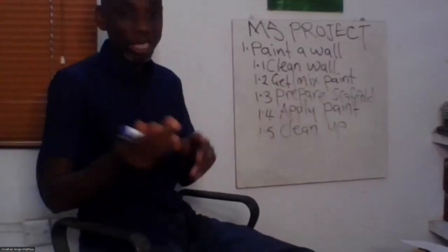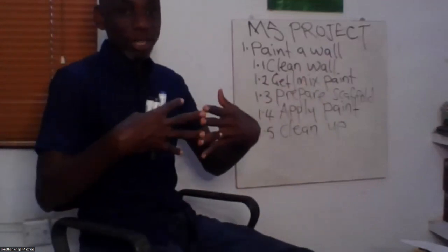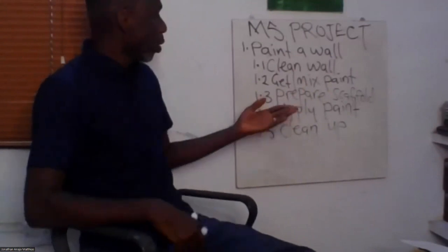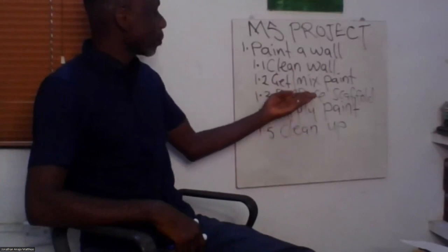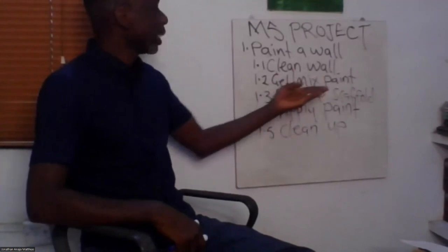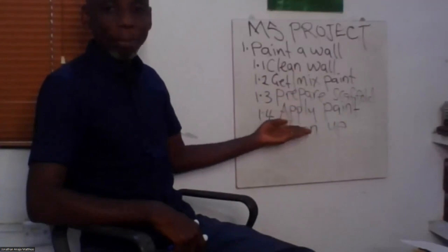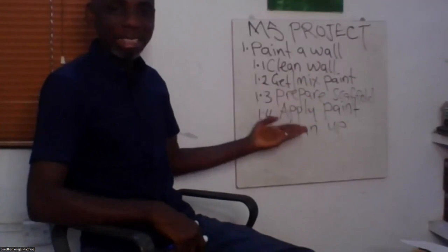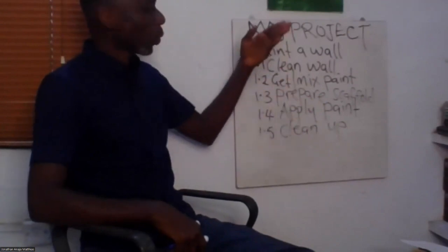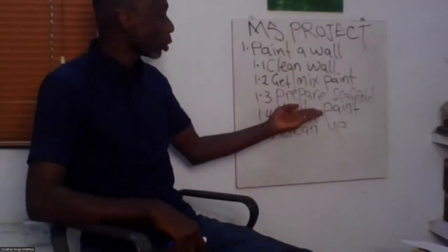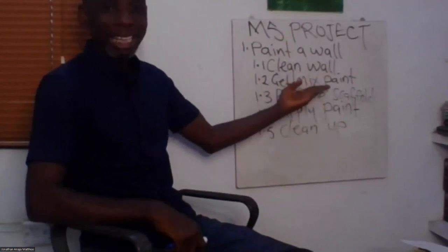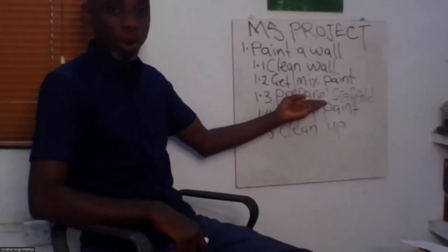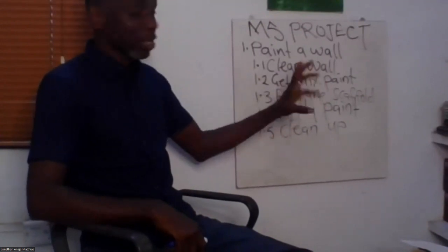Some of these things, I told you there's a way they can relate. Sometimes you can do them together. Sometimes you can do one before one. But of course, getting paints is a predecessor to applying the paints. Application of paints is a successor to getting or mixing the paint. You cannot apply paint until you get or mix your paints, right? I'm skipping this intentionally, but I'm going to show us shortly where some of these things relate.